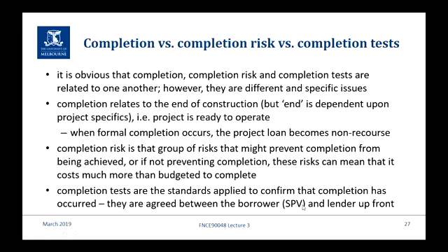So the completion tests are agreed between the borrower and the lender, the SPV and the lender. And as I indicated a little earlier, if you're an SPV and you've got a bit of experience in this area, what you're trying to do is have limited and easy completion tests. What the lender wants to achieve is having completion tests that give them a very strong level of comfort that the cash flows can be generated.